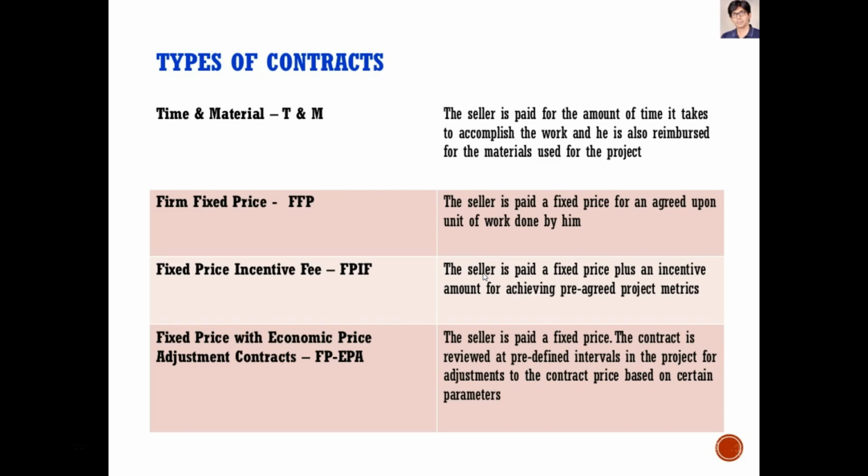We had made an agreement with US West or CenturyLink or whoever it was, and if we didn't get that fiber turned up on a certain date, we actually paid per day, and in some cases it was fairly expensive. I think one contract was like $1,500 a day that we would pay as a penalty off of the price. So there's all different kinds of changes to these. So contract management in a lot of projects is really a full-time job.